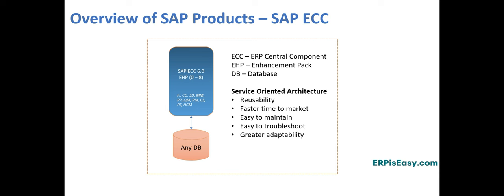What you see on the screen is the Cloud ALM implementation process view. So the steps are as follows. Design, build, test, and deploy. You create SAP system functionalities based on business requirements during the design phase. Fit to standard workshops should be held to convert those business requirements into standard SAP processes. You begin configuring the software when the design is finished. The configurations should then be tested. Finally, you will then deploy and go live with the product or solution.